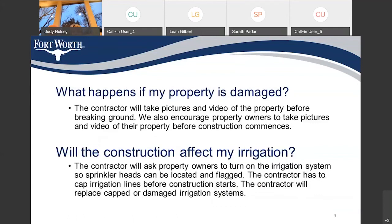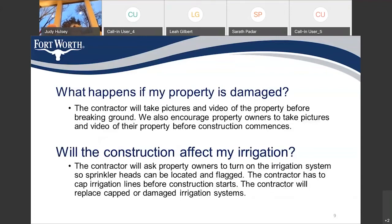What happens if my property is damaged? The contractor will take pictures and video of the property before breaking ground. We also encourage property owners to take pictures and video of their property before construction commences. This will be for yours and the contractor's protection. If any property damage occurs, video and pictures can help confirm that said damage happened before, during, or after construction. The contractor is responsible for restoring to original condition any damage that occurs due to construction.